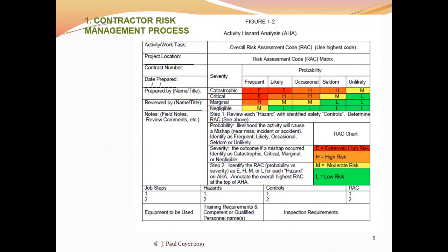Another task or activity associated with that defined feature of work is constructing the forms. Another is pouring the concrete, et cetera. So for each defined feature of work, there are a number of tasks or activities that are required to get things done, and you need to identify those.